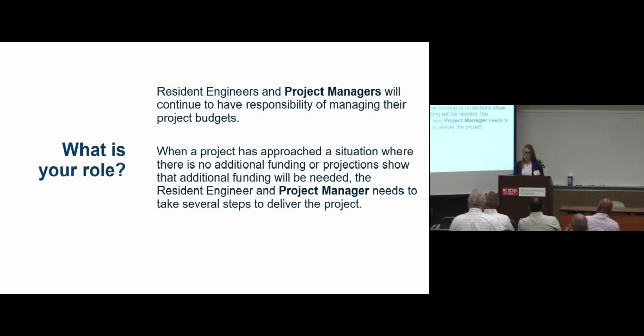And so what is your role? As project managers, once the estimate is done, as John talked about earlier, it then gets going, and you are responsible for managing your budgets. Once it moves into construction, this responsibility transfers over to the resident engineers. But if you have a project and the projections are showing that you're going to need additional funding, it is your responsibility to start taking some additional steps to deliver the project.